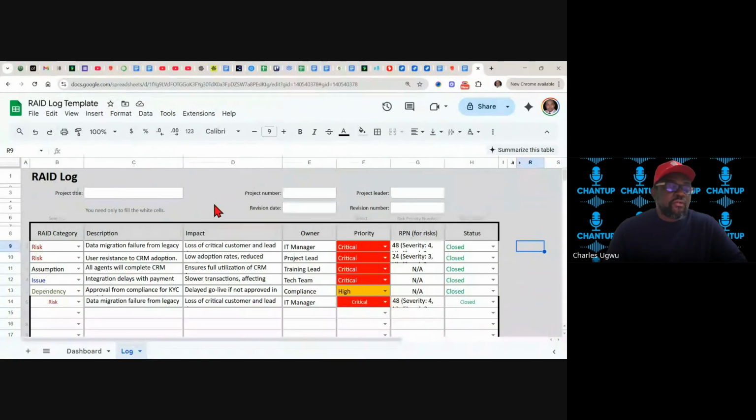If you find out that 12 hours shift is still not enough, you can just say, okay, I'll call a meeting, guys. You guys see, we still have a lot to do. Please, I want you to be coming on Saturdays. I'll be paying you double. And that's the way. This is a mitigation plan. You've already put in place a mitigation plan. You are working on your plan to resolve this risk. That's what we call a mitigation strategy.